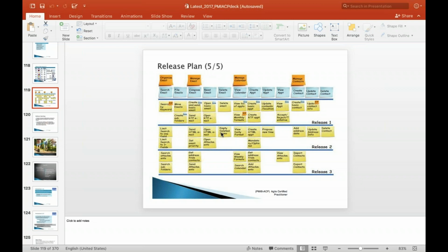If it is T&M, based on that, they do the billing to the customer. If it is fixed, for each iteration, we go for a fixed price. So there are a total of 22 iterations you have to work. Each iteration, I'll pay you $1,000. 22 into 1,000, $22,000 will be the cost of the project. Okay, got it. Thank you.